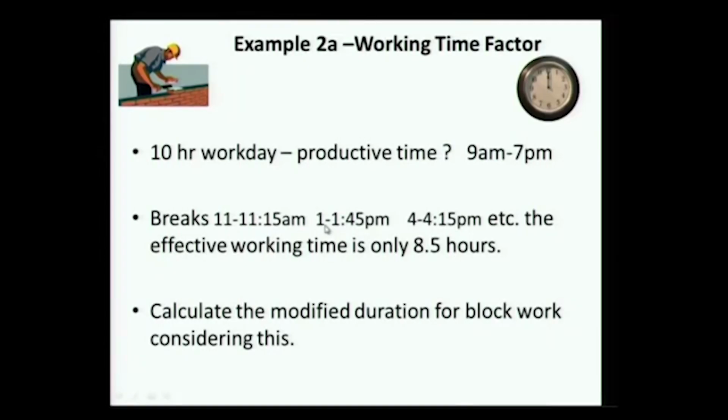The person is not going to be constantly working. There are breaks in the work time. At least in many of our sites we have a tea break, lunch break, another tea break, and we will get probably 8.5 hours of effective working time.